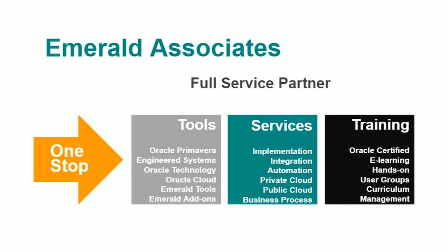Because really what you're looking at is what I call the layers. So we've got the enterprise project structure, we've got projects, we've got WBS elements, we've got activities, and the activities subset into 3 pieces: the resources, the expenses, and the steps. So you need to understand and get a bit of a game plan for your team on how you use all those layers. Let's take an action item, Shannon and Mary Lynn, to get another webinar in the not too distant future on basic P6 information that we can invite all the participants to.